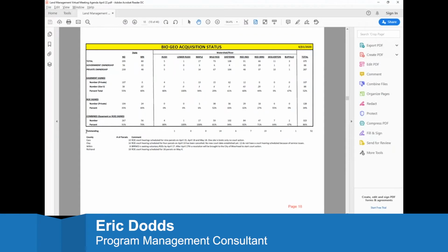In some situations, when we've exhausted all of our options, we've filed an affidavit of non-found. Basically, we've exhausted all sorts of options to contact these people, and they've been elusive or not willing to respond, so we had to resort to filing these affidavits. That's added a bit more time to our process than we had originally anticipated, and because of that, there are some areas where we are falling behind schedule. Again, we're hoping to negotiate all of these voluntarily, which is certainly the quickest and easiest.